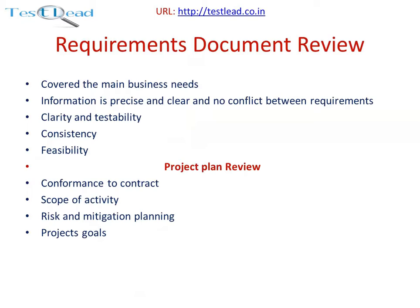Requirement document review covers the main business needs, ensuring information is precise and clear with no conflict between requirements, clarity and testability, consistency, and feasibility. Project plan review covers conformance to contract, scope of activity, risk and mitigation planning, and project goals.